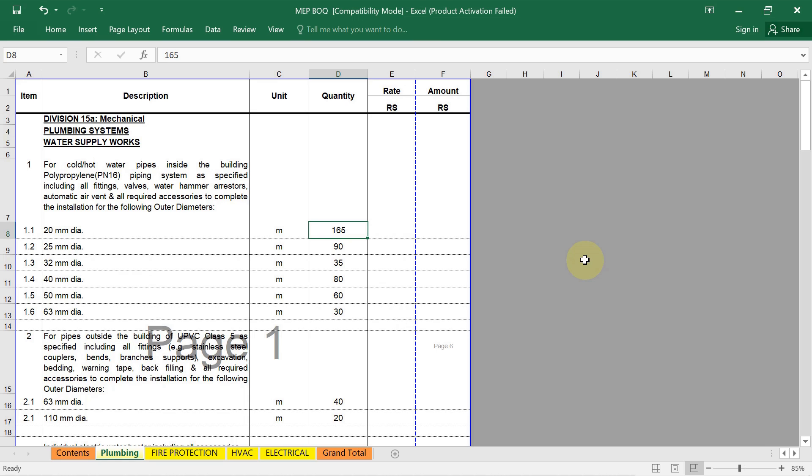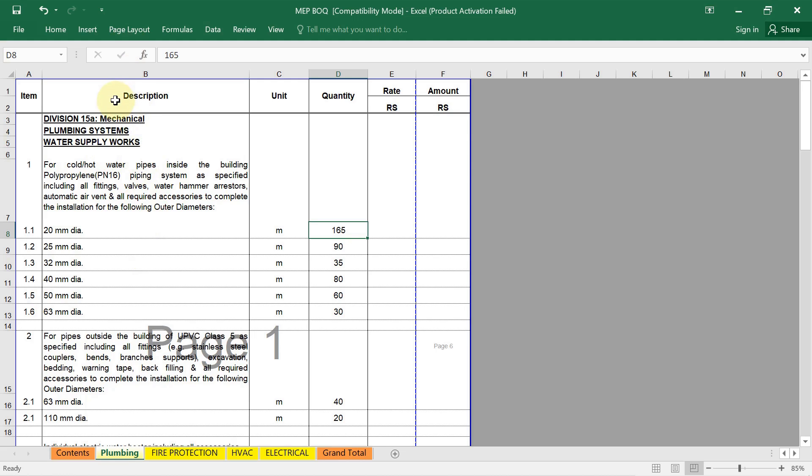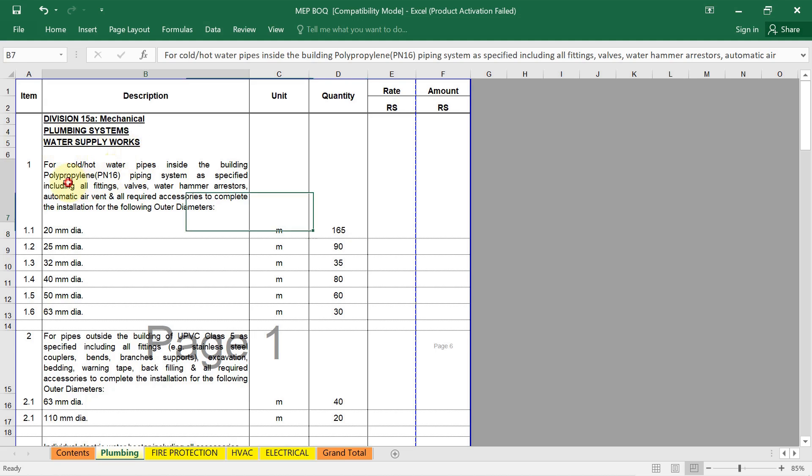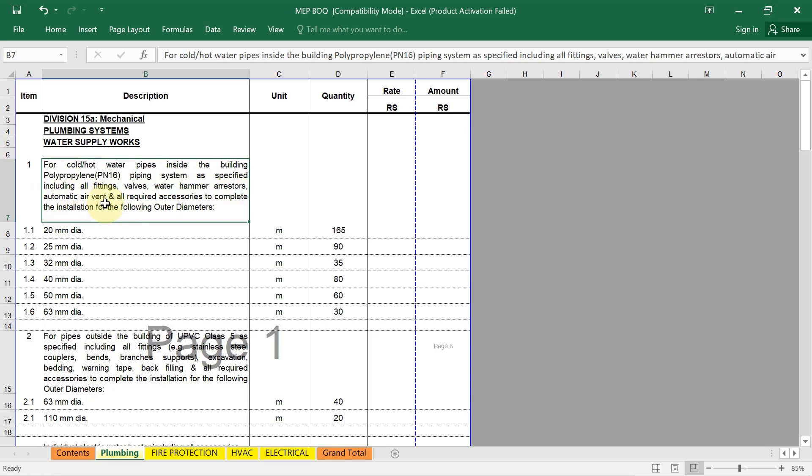Finally, we have to prepare the BOQ documents. Here in the BOQ documents, you can see this is our plumbing system, water supply work first. Then we have to see the drainage work. Here in the water supply work, in the first, you can see the item description is written. In this description, we have to provide a clear and detailed description of each item. Let's say this is our water supply work for cold or hot water pipes inside the building. See their material as specified include all fittings, valves, water hammer arrestors, automatic air vents and all required accessories to complete the installation for the following outer diameter. Here we need a detailed description of each item. Here they are talking about the cold and hot water pipes which we are running inside the building.